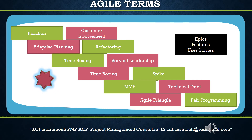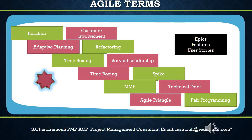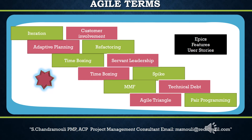Tenth, technical debt: technical debt is the total amount of less-than-perfect design and implementation decisions in an agile project. It is a known technical problem in the code. As technical debt decreases, the velocity — the number of story points completed per iteration — will start to rise again. A good rule of thumb in agile projects is to spend 10% of the iteration on addressing technical debt.